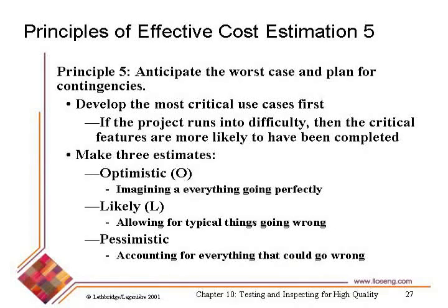You need to pinpoint what you expect, but you need to be prepared for the worst case and tell your customers that there are some things that could go wrong and that you shouldn't sort of bank your entire company on this deadline. Maybe things will go wrong, and then you keep updating the estimate. You keep informing your customer as to how things are going and adjusting the estimate on a weekly basis, so that they are aware of whether you're meeting your original estimate, whether you have to adjust it back a bit. The worst thing to do is to adjust your estimate at the last minute. That's often what happens. Okay?